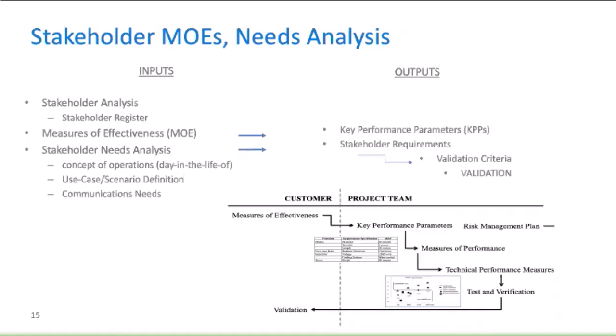Now remember, verification of your outcomes means technically it does what you stated the project would do. Validation means that your customer, your client, your sponsor agrees that what you gave them is what they need, even if it's not what they identified at the beginning of the project, because you have accurately defined their needs and you have managed change carefully, they have been involved the entire time throughout the project, and they are satisfied with the outcomes of the project.